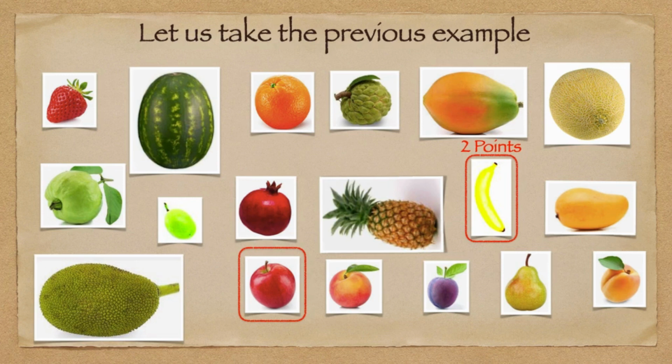So considering complexity, uncertainty and volume of work involved for apple with banana, obviously the team identifies it is definitely bigger than banana. Apple is bigger than banana. Now how many times? Roughly, 3 to 4 times. Maybe in a couple of rounds of discussion, they realized that it is 4 times bigger than banana. So obviously 4 times bigger than banana means 4 into 2, 8 story points.